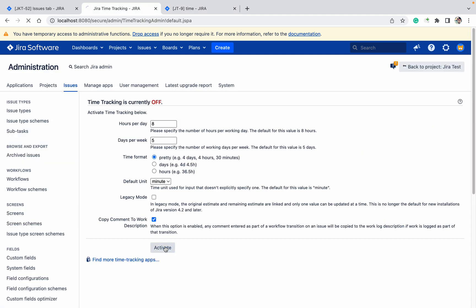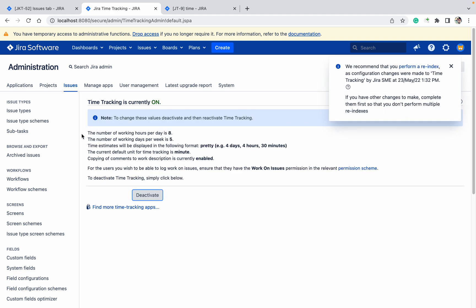Let me activate it again — it's enabled. How many hours are required for a day? In general, 24 hours, but in Jira and the software industry, eight hours is considered one day. You get nine hours total, with one hour for lunch, leaving eight working hours. For days in a week, generally seven, but with weekends it's five days. You can set days as 'd', hours as 'h', and minutes as 'm'. By default, it's taking minutes because I provided eight without specifying a unit.